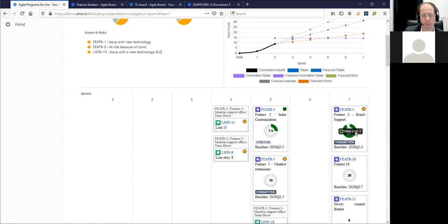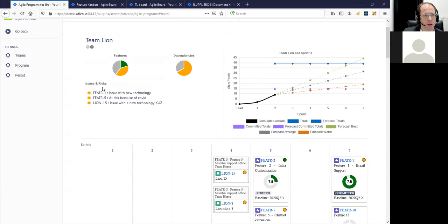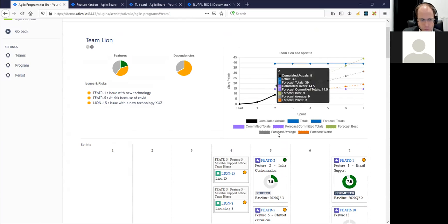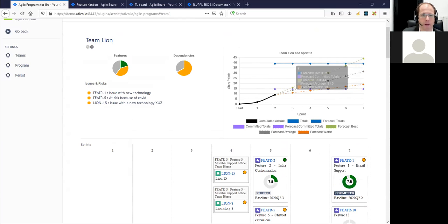Because if the Scrum Masters come up front and tell about the progress, they tend to explain a lot of details. If they can simply show it and say, okay, this is on track, we don't need to talk about it, let's really focus on the few issues and risks that need to be talked about, and the dependencies that we need to talk about. So that's what we see here, and we also see the metrics at the top right have been updated.